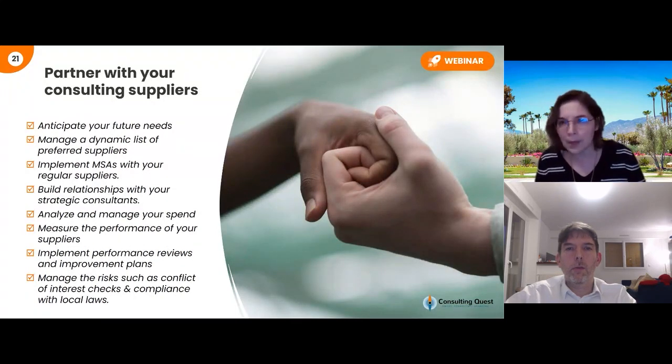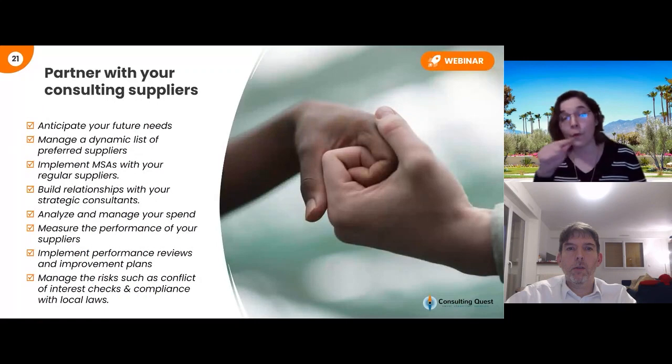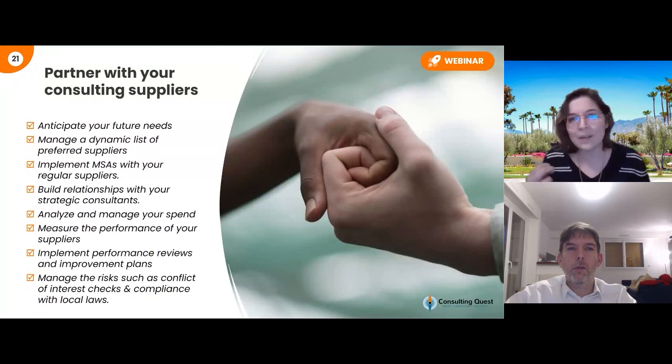Because there's one thing that's true, when you're able to build that intimacy with your suppliers and consulting suppliers, then the project can start much faster. Why? Because you are able to implement MSAs and you have already pre-negotiated some of the terms and conditions for the project, and therefore the sourcing process goes faster.